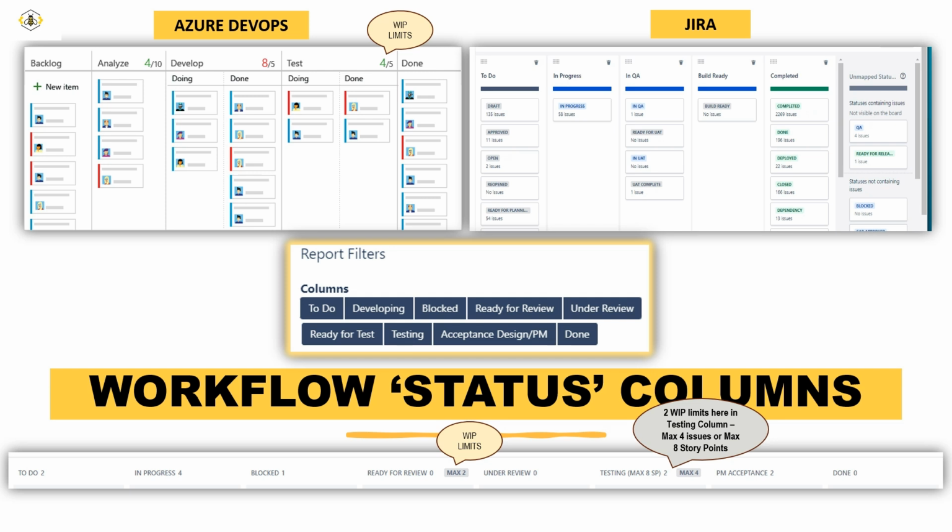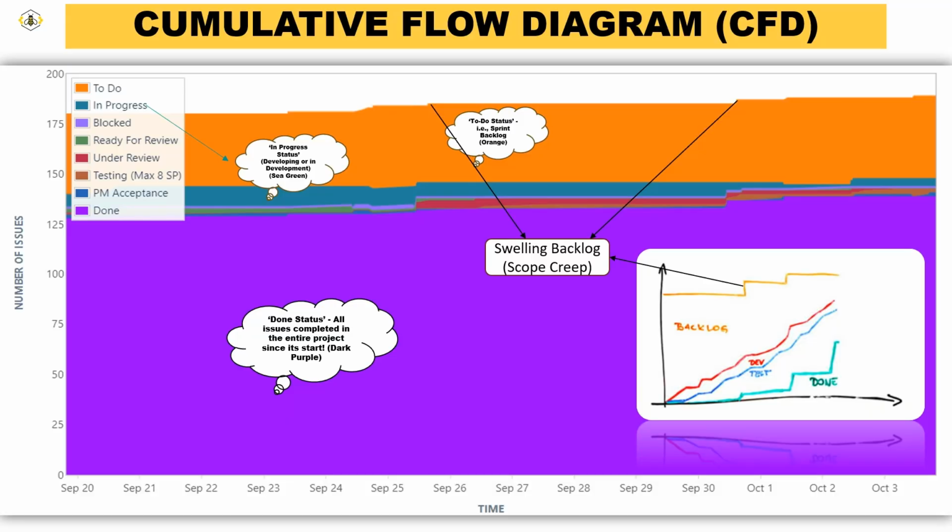It is also important to set WIP limits. Setting WIP limits to control the number of tasks in progress at any given time helps teams focus on finishing the checkout flow feature before taking on more tasks, and you will see the in progress band narrow down.